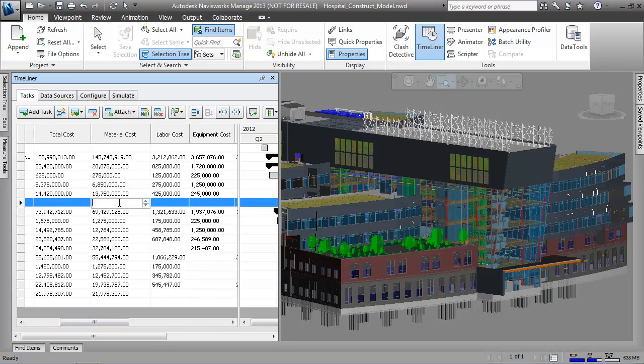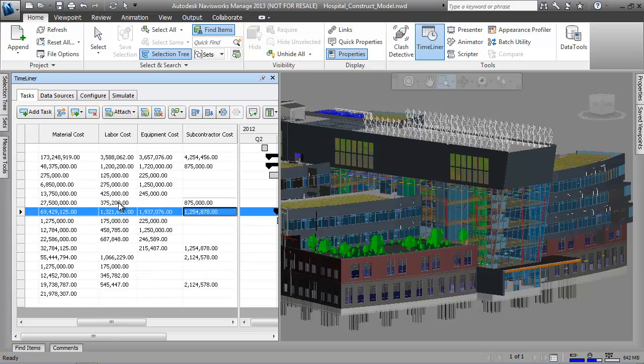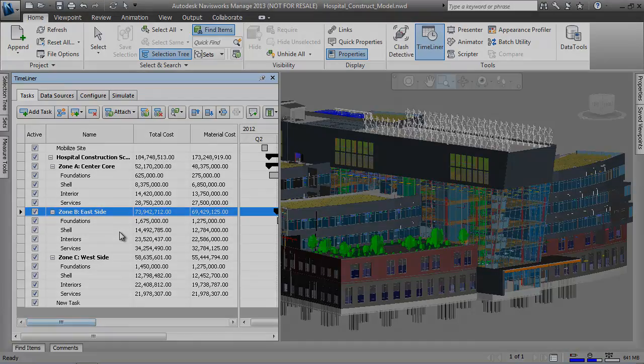By having these categories loaded into our schedules, we can simulate how our project costs are accrued over the entire project duration, as well as take a snapshot of expected costs at any point in the project schedule.